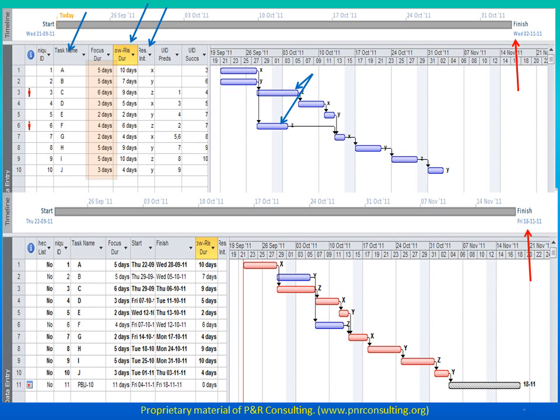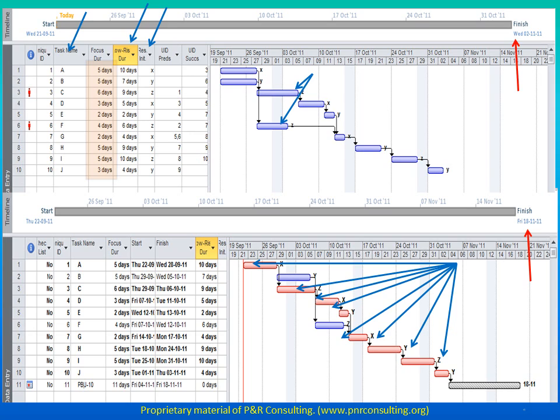Also, we have the critical chain being drawn, with a single click, using the CCPM add-on. One can notice that a buffer is being created to protect the project. The concept behind creation of buffer is that the completion of a project is more important than the completion of a task alone. This approach allows us to focus on project completion and not on individual task completion. Having had a short introduction about this project, let us analyze the benefits of the buffer management concept in project execution.